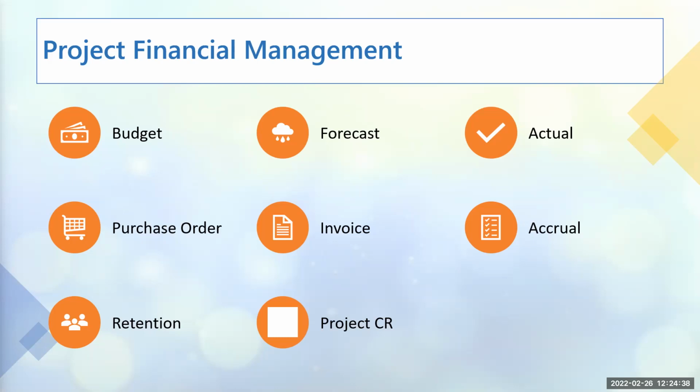I'll start with the project budget. Project budget is the allocated funds to deliver the project. And that takes into consideration the resources that will be involved, the time frame it is going to take for those resources to do the assigned work. It also includes the licenses and different materials that may be required to deliver the project. So that is how they develop and create a project budget.